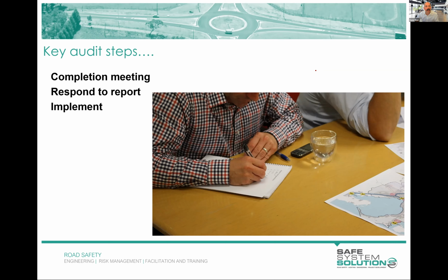Now, the responsibility of the road safety auditor has ended. I drew the line not quite where I wanted, but it ended there. You've handed over your report of advice, and it is advice. You've said, there you go, designer or project manager or the like, here is our advice. They do not then respond to you.